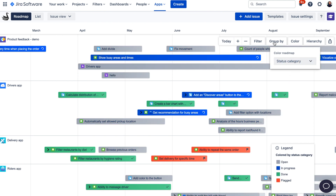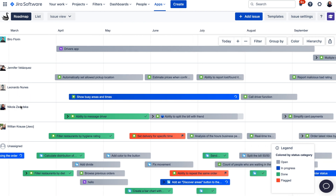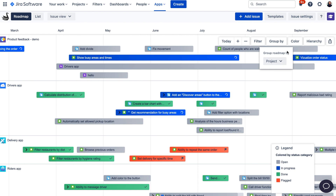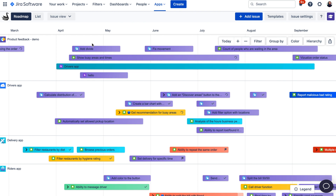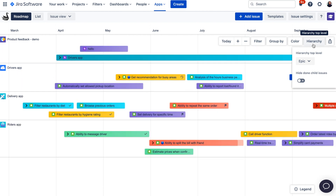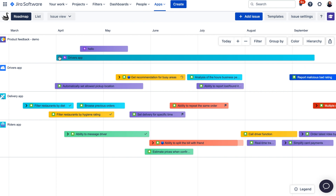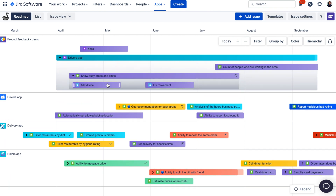These three customization options — filters, grouping, and colors — are very powerful and let you customize your view exactly to your own needs. For example, you can create an assignee roadmap to visualize who is working on what and when across projects. You probably noticed that when scheduling issues on the roadmap, everything appears in a flat view, so your epics are on the same level as stories and subtasks. If you would like to see issues in a hierarchical view, you can use the Hierarchy button to select the hierarchy level — for example, epics on top, then expand them to see their stories, and further expand those to see the scheduled subtasks.